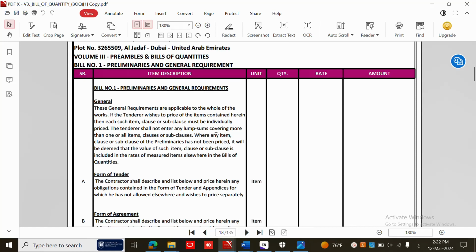No, labor is included in the QS prices or in the other items, but only the engineers and the foreman are included in what we call overhead prices. For the management, if the contractor company has a separate office, they have to cover this office expense. That's what preliminaries are in general.